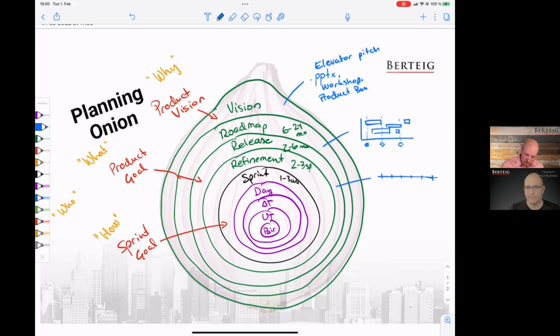And so then I would say, okay, so we have February here, and we are right here right now. Let's put a dot there. And you said that would be March, April, May, that would be beginning of June. So you said somewhere in June you want to release it. So okay, let's put it half in the middle of the month. All right, so that means we got 4.5 months time. So what are the goals you want to achieve? And so they would tell me, these are the major epics or major feature areas we want to launch in that schedule, and there's some kind of connection and rationale for the business and time. Then I said, okay, fair enough.